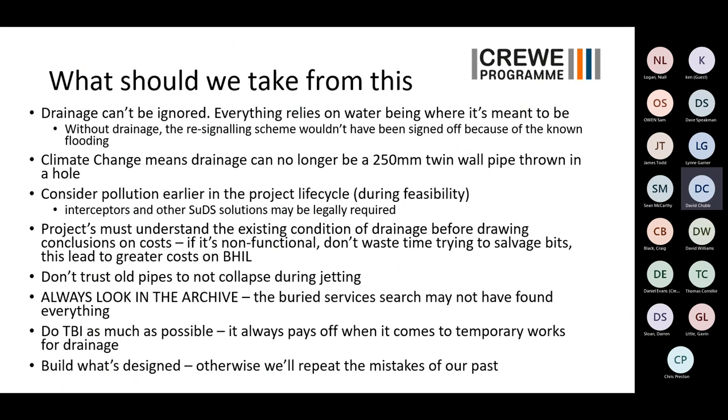Seriously, it needs to be thought about earlier because permits take a long time to get if you need them and they cost some money. You can always get them. It's not like planning permission, but they will always set quite a high criteria for what you need to achieve in order to get one, generally. Good relationship with the EA, always beneficial.